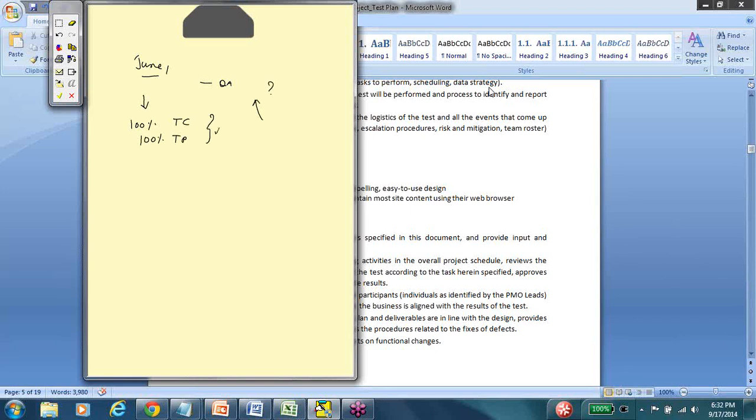No, because QA is a reactive job. We will always have to be in line and in sync with the other teams, especially the development team. So when we write a schedule or a milestone list in our test plan, this needs to be reviewed and approved by the technical team. Otherwise, they might not be ready yet to deliver the developed project, but if we plan to test at that time, it will be a conflict of schedule.